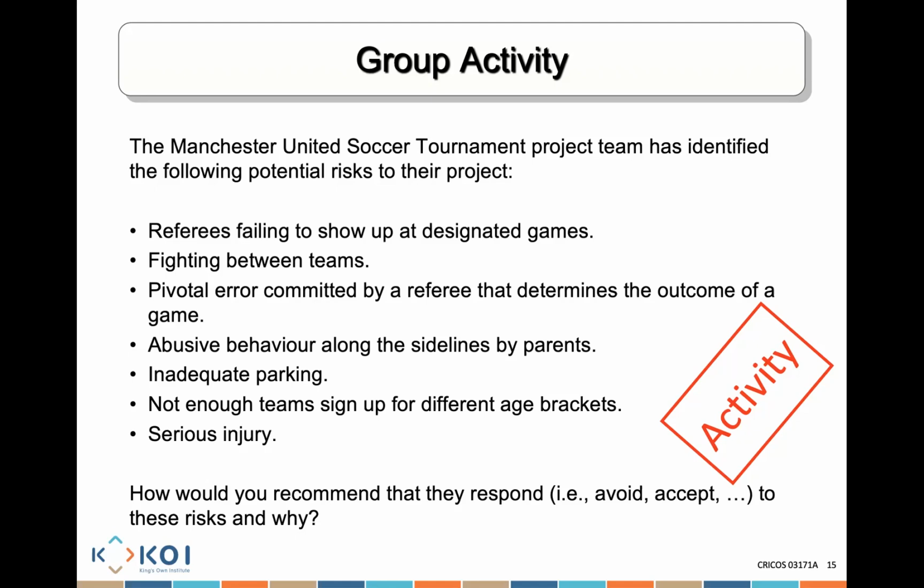We will be mitigating it as well. How do you do that? By training or telling them what to do, what not to do in the field. Okay, we might try and mitigate it by telling them that they accepted the behavior. Is there any other way for us to deal with it? Retaining risk? Yeah, you could retain risk, and you could even transfer it. You might say, I'm going to assign a responsibility to the coaches to manage, or I'm going to assign it to a security company to deal with that issue.